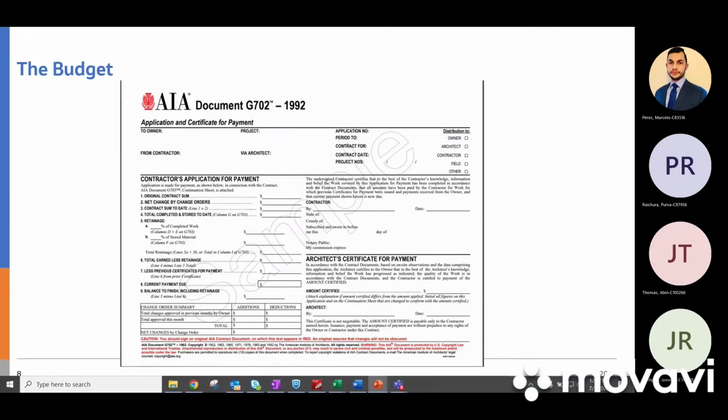As the owner's construction manager, you'll also oversee the day-to-day activities of the general contractor. You're overseeing and monitoring the whole project, right? Now you need to focus on the construction budget. The GC, on a monthly basis, sends you a payment application. We call it requisitioning. Requisitioning is the periodic billing for the value of the work that was completed in that period, again, on a monthly basis.